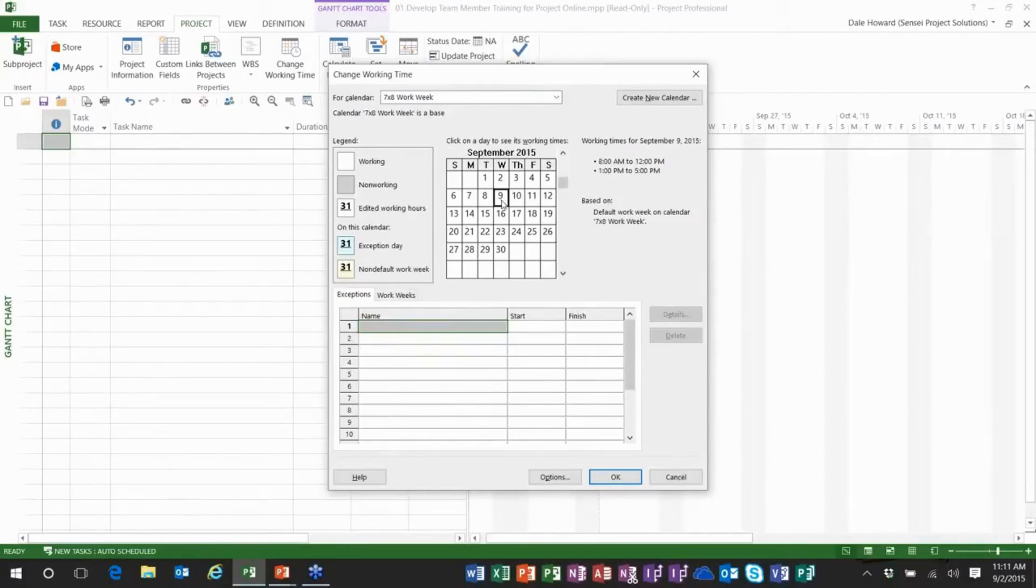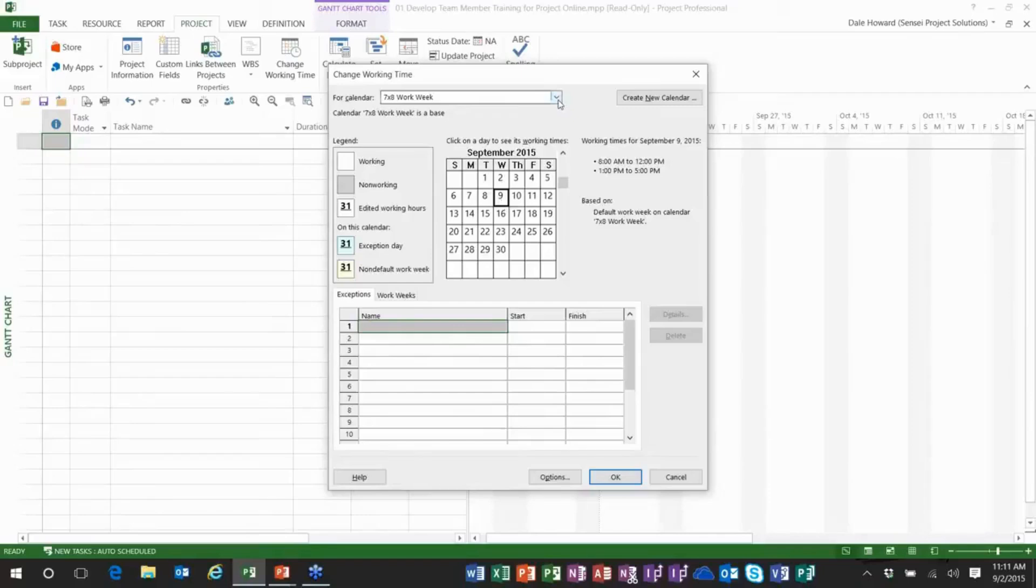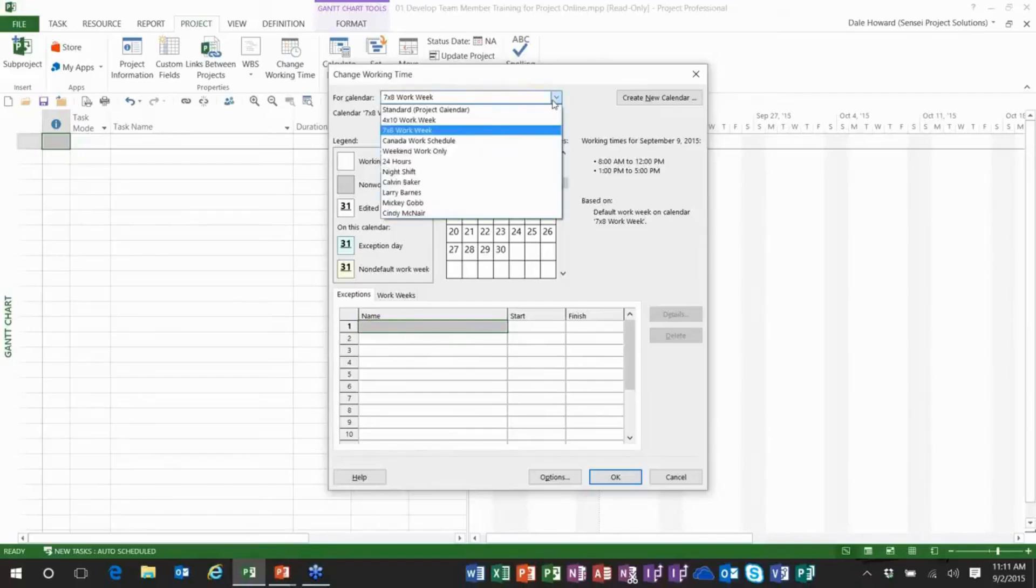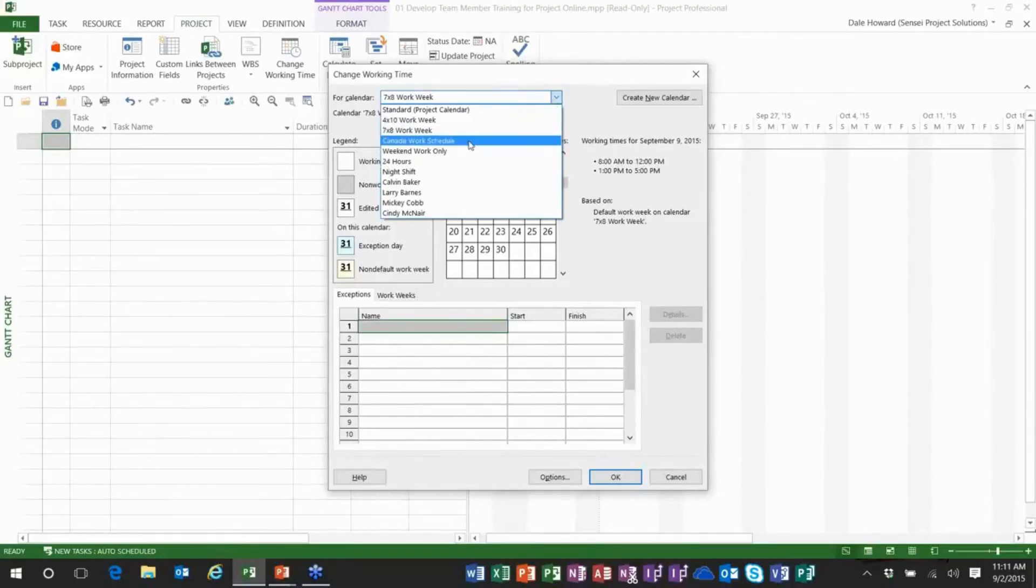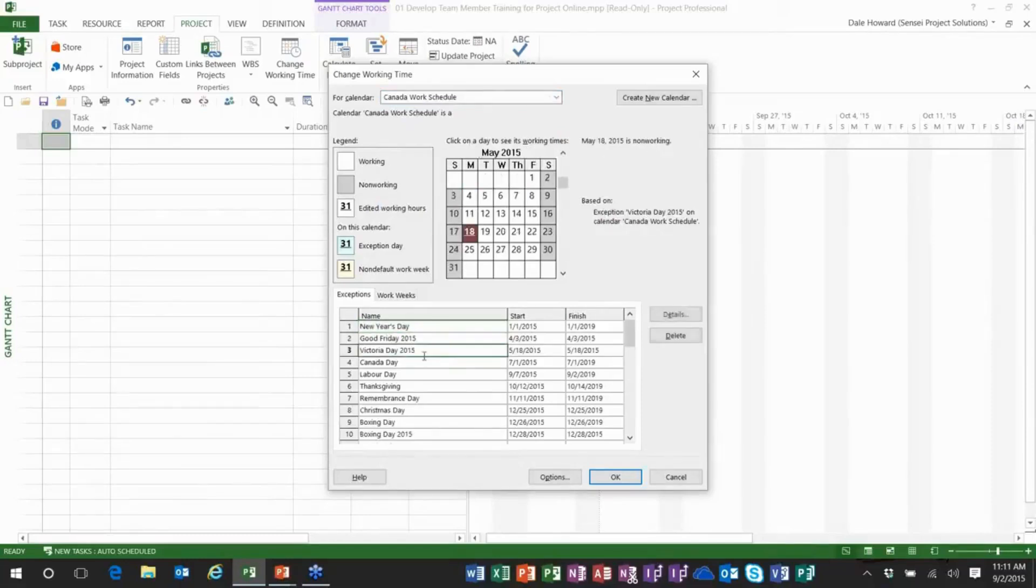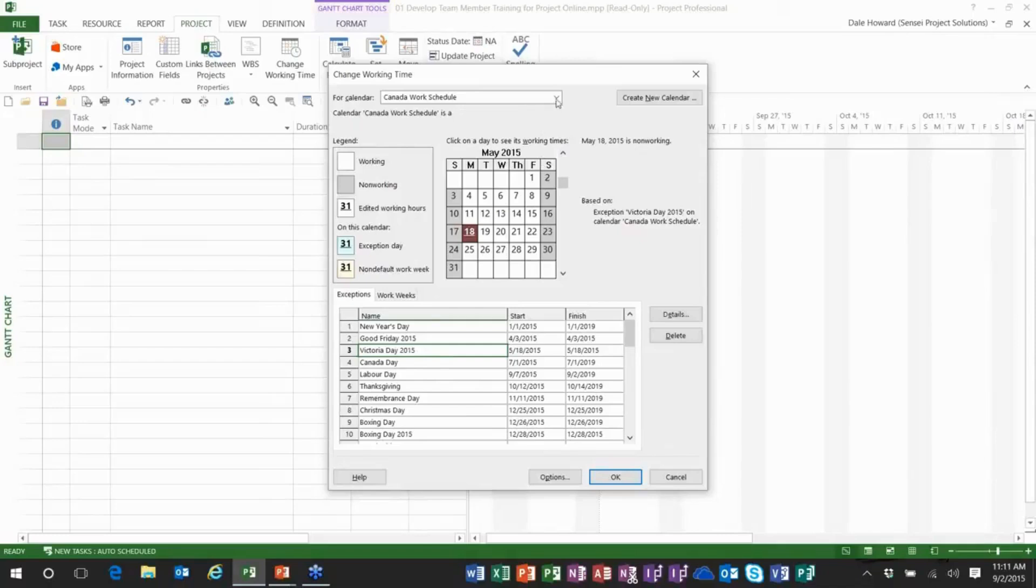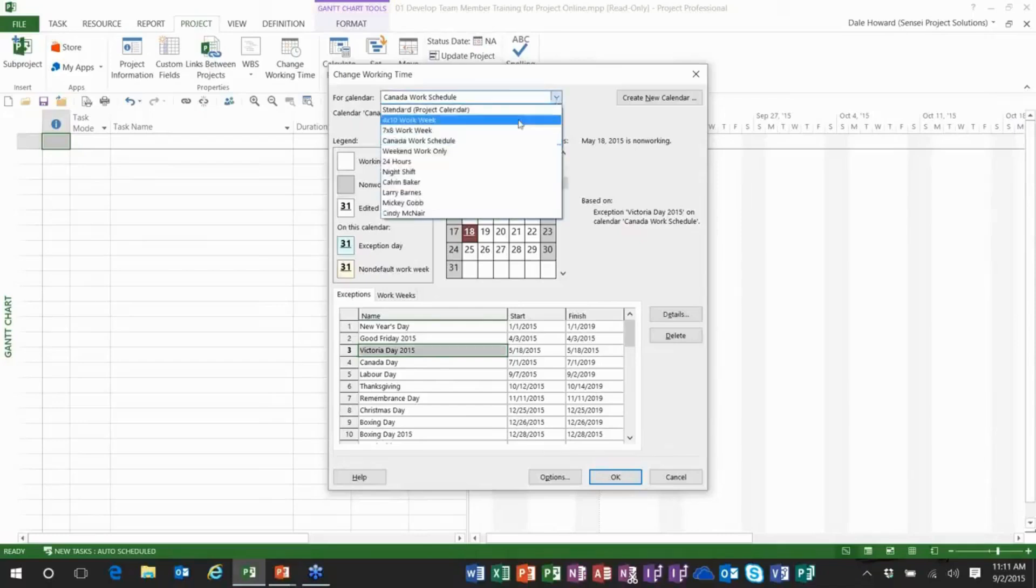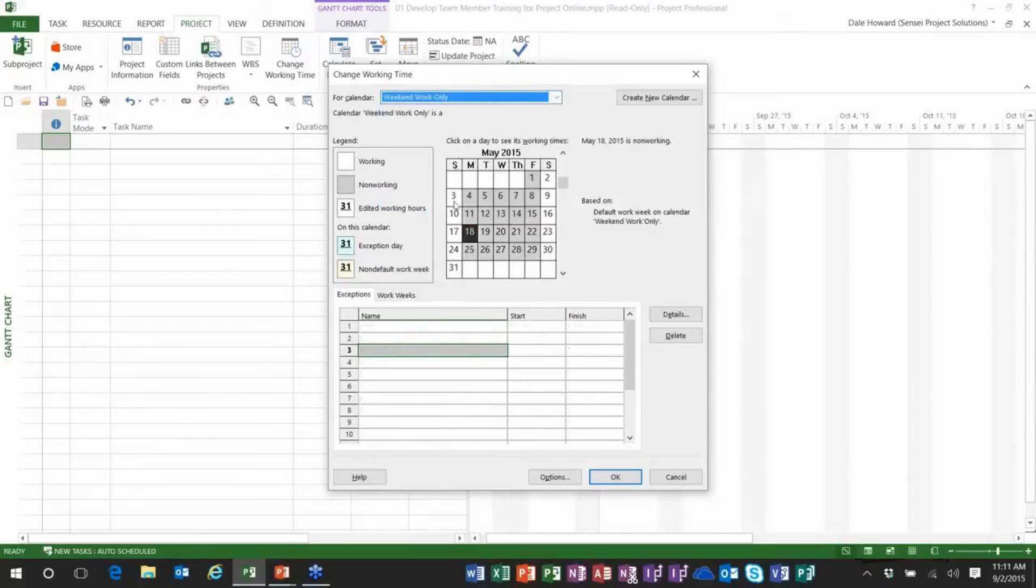It is not uncommon on projects that are slipping right at the end to try to catch up by going into seven day a week mode or if we have any unusual scheduling situation that needs to run seven days a week but only eight hours a day with humans assigned. For our Canadian team members I've also created a Canada work schedule calendar and we can see on the calendar that we have Canadian holidays that we don't have in the U.S. such as Victoria Day for example.